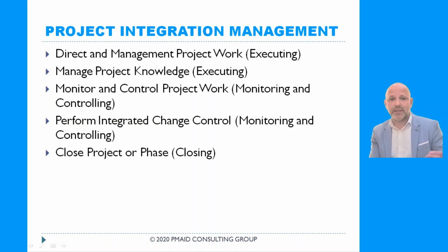And then we engage the process of integrated change control. We create a change request and we look at all the triple constraints, trying to see if we can afford it in terms of time, in terms of budget. We also look at other restrictions. We see if there are any risks as a result of the new feature implementation. And this is all part of the integrated change control.